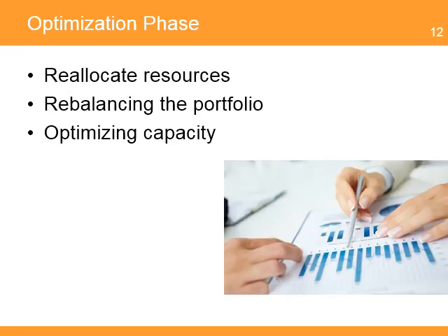An example of the optimization work is when the water and sanitation project is closed after successfully delivering all planned benefits. The portfolio manager will need to evaluate the impact of removing the project from the portfolio and how to reallocate the organizational resources assigned to this project. This will include the task of rebalancing the use of administrative support to other projects and ensuring the current capacity of the organization is used to its optimal level.